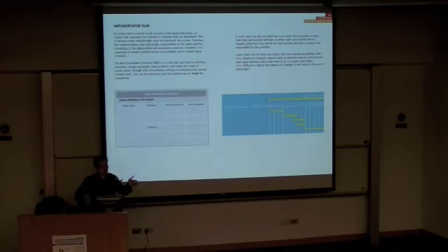Okay, so describe the steps with the timeline. Don't just describe the step, but how many months or how many weeks step A will occupy you. Okay, so spell it out in a Gantt chart. Then it will be diagram-based, which is enough. You don't need to use a lot of paragraphs to do that, but use a diagram like this Gantt chart. Okay, you can draw it in your own Excel.